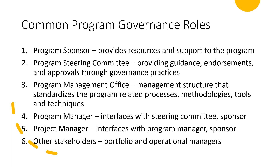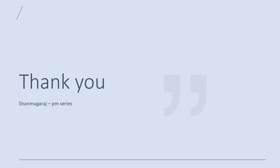The program management office is a management structure that standardizes program-related processes, methodologies, tools, and techniques. The program manager interfaces with the steering committee, sponsor, and project or component managers. Finally, portfolio managers and operations managers interact with the program and project managers, as well as with PMOs and steering committees.